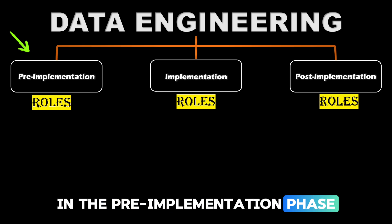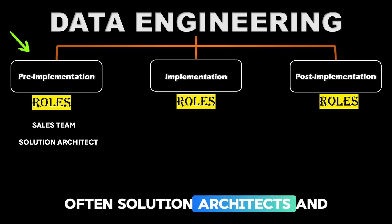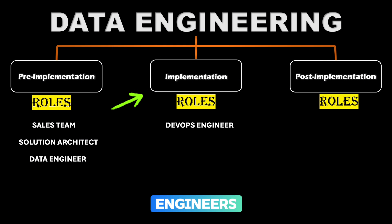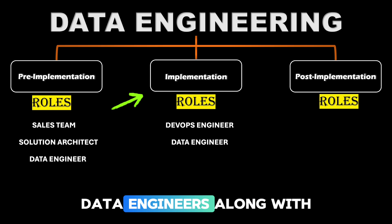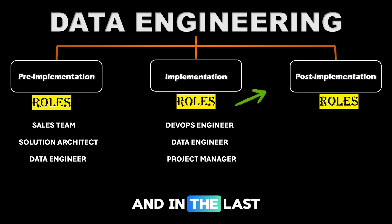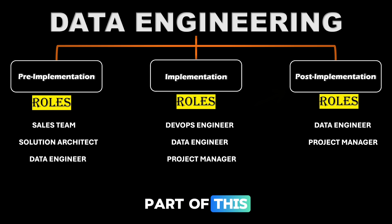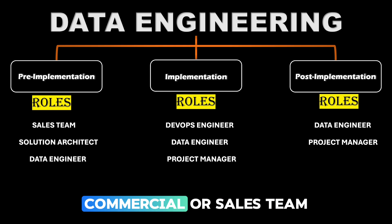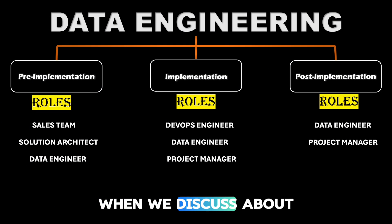In the pre-implementation phase, most of the time someone from the sales or commercial team will be involved, and from the technical side, often solution architects and data engineers will be involved. In the actual implementation phase, someone from the infrastructure team — often called DevOps engineers, infrastructure engineers, or platform engineers — will be involved, along with data engineers and project managers. In the post-implementation phase, mostly data engineers and project managers will be part of this. These roles are applicable for both product-based and service-based companies, though the definition of the commercial or sales team differs between them.